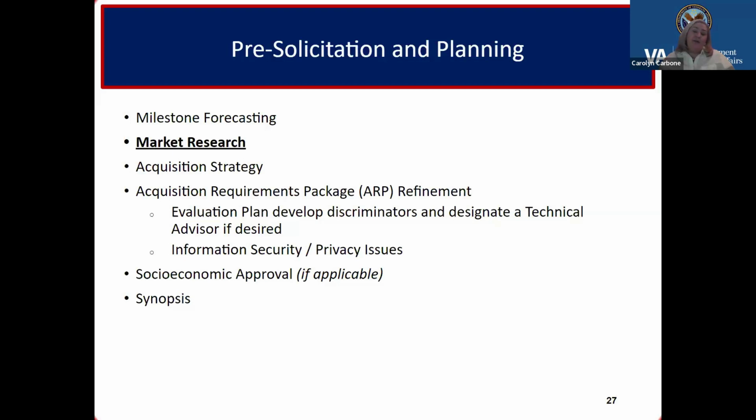I know we buy information technology where I work, and we have some vendors, such as Microsoft, for example, who do not sell their products directly to the government. So we know that when we have a big Microsoft purchase, we're going to have to look into who they're reselling through to the government these days in order to determine where we're going to go out and purchase that software.